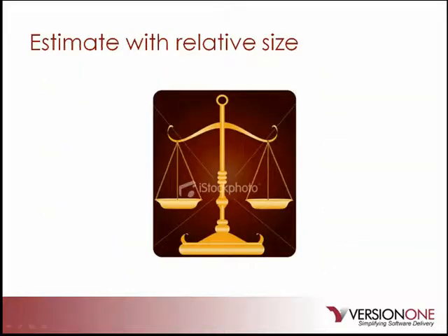So now that we've prioritized the backlog, the next step is applying an estimate to them. This will help later when we need to determine how much we can complete in a given time frame or within that iteration. In the traditional approach, the estimates were originally given in numbers of days or hours. The Agile approach focuses on estimating the size of a story because it is more accurate and quicker to generate. So let's look at an example of that.